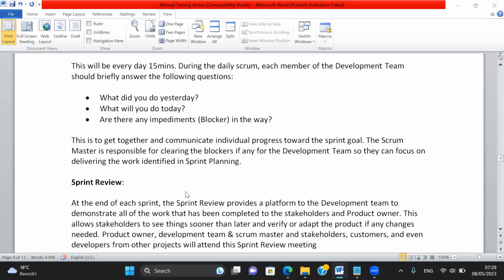So in sprint demo, who will give demo to whom? Scrum Master gives the demo to the product owner? Is the Scrum Master a technical guy? No. Then how can he give the demo? The Scrum team, the people who have developed and tested, they know more about the application. So the Scrum team will give the presentation, the demo, to the product owner.